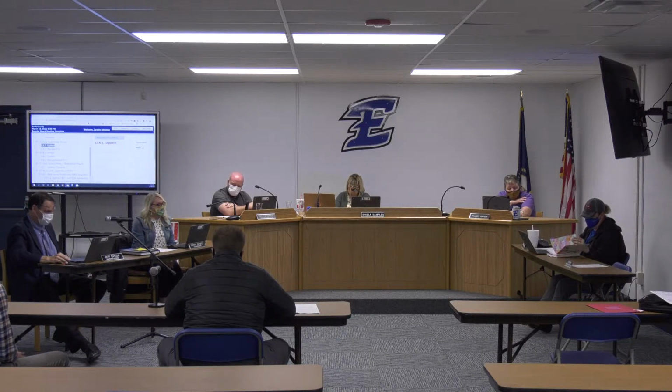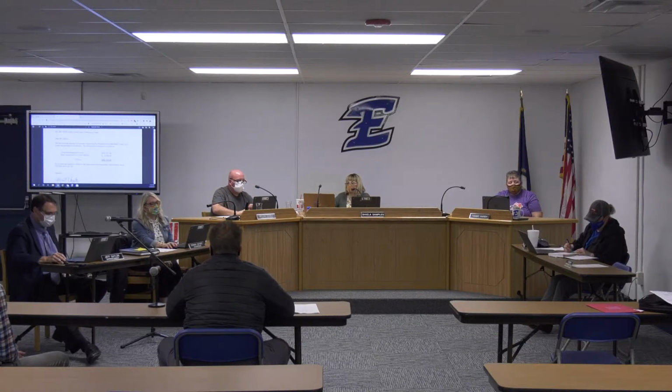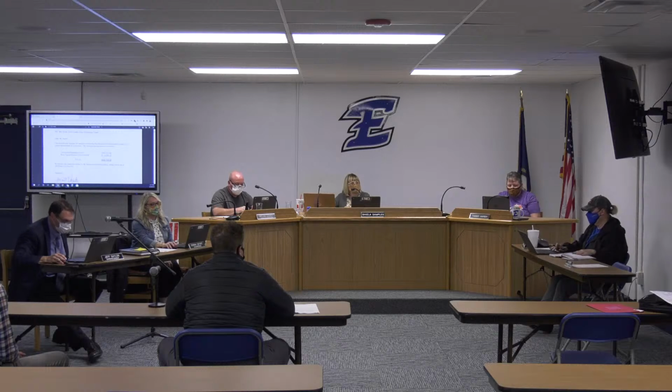Okay, thank you for that update. We have pay application number 19 to consider. I'm going to see if it'll pull up real quick. Yeah, it's doing a lot better tonight. Last time it was really slow. We have a pay app for this project. It's pay app number 19. It's for $587,770.28. It's my recommendation that that payment is made after review by Codell and Ross Tarrant.